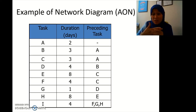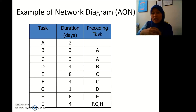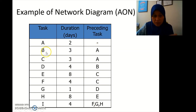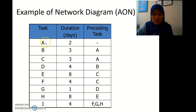We're going to have a Gantt chart, and from this information we have all the tasks here — A until I — with durations given in days and the preceding tasks. For example, after A we have B, and after A we also have C. You have to translate all this information into bubbles and arrows.